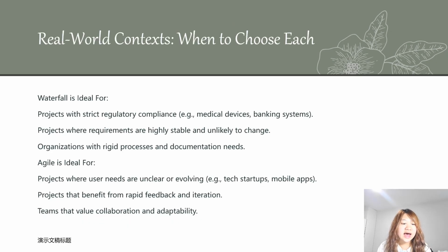Waterfall is ideal for projects with strict rules like medical devices or banking systems, where requirements are stable and documentation is mandatory. Agile shines for projects with unclear or evolving needs like startup apps or consumer tools, where rapid feedback and quick adjustments matter most.